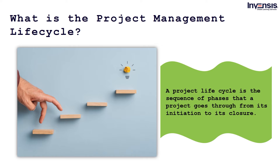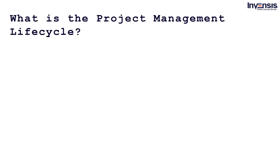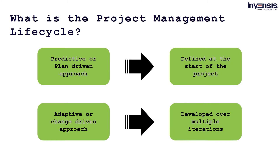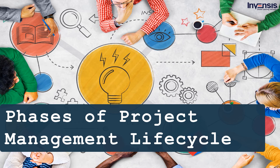The project life cycle can be defined and modified as per the needs of the organization. Even though every project has a definite start and end, the particular objectives, deliverables, and activities vary widely. The life cycle provides the basic foundation of actions to be performed, irrespective of the specific work involved. Project life cycles can range from predictive or plan-driven approaches to adaptive or change-driven approaches. In a predictive life cycle, the specifics are defined at the start and any alterations to scope are carefully addressed. In an adaptive life cycle, the product is developed over multiple iterations, and detailed scope is defined for each iteration only as it begins.